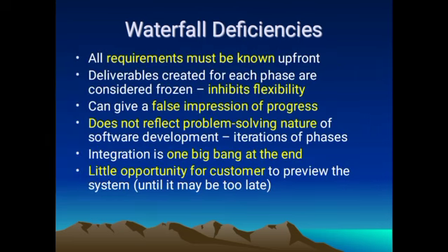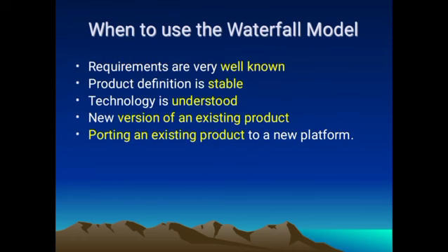Waterfall deficiencies. All requirements must be known upfront. Deliverables created for each phase are considered frozen. Can give a false impression of progress. Does not reflect the problem solving nature of software development. Integration is one big bang at the end. Little opportunity for the customer to preview the system.